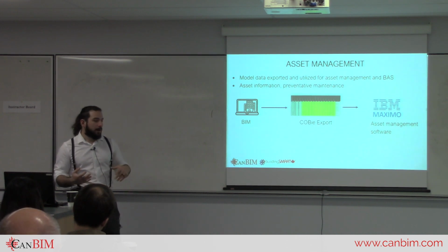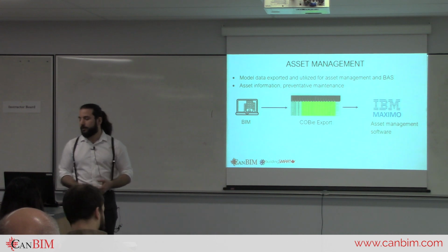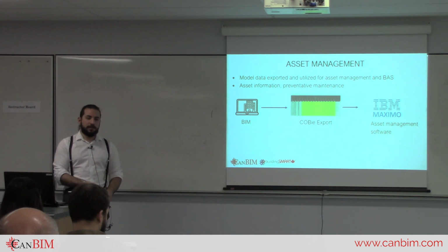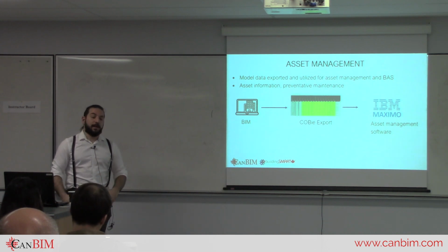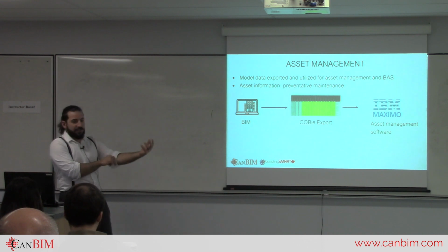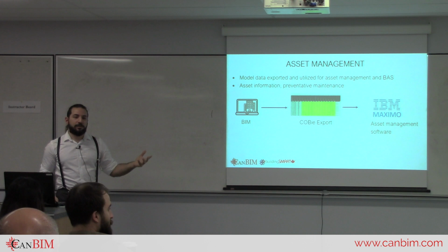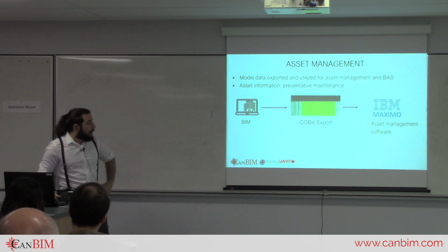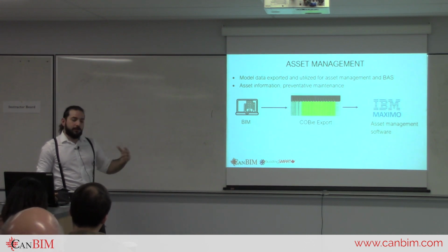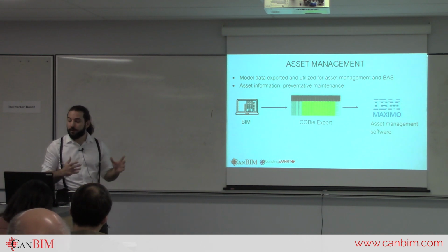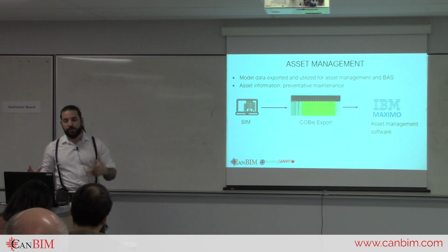And then the contractor just comes in, and they could also provide information for like, who's the manufacturer, because there's this whole thing where they can actually install something else that performs the same. That's always fun. So there's no point in the designer actually kind of entering that data. So they can also enter the manufacturer, warranty data, who do you need to call if this breaks down, and all that. And then this information can be just pushed down to your asset management software.